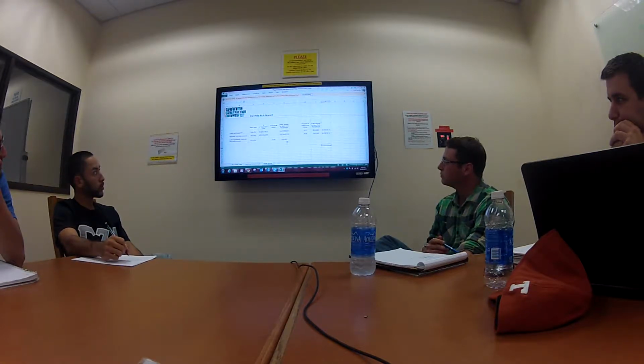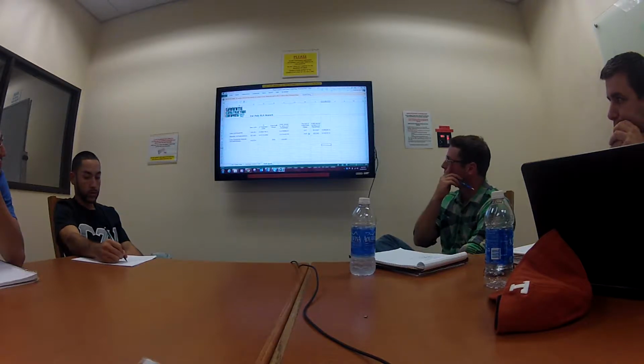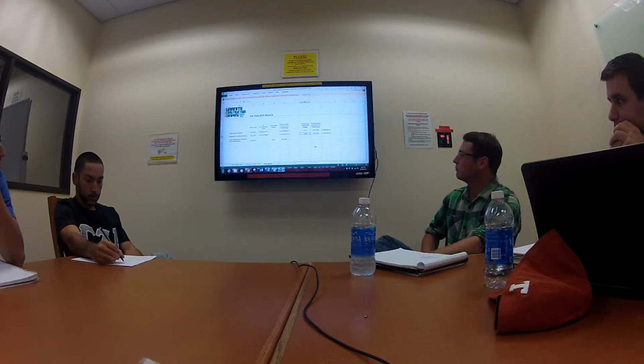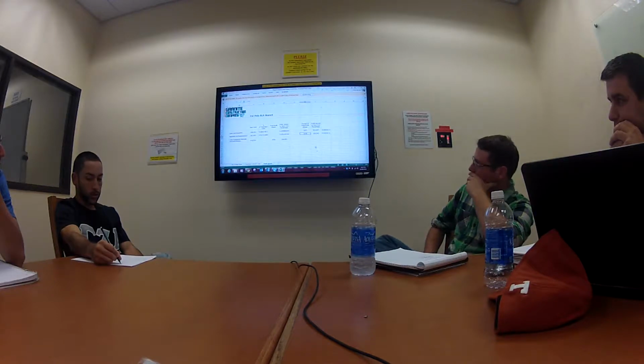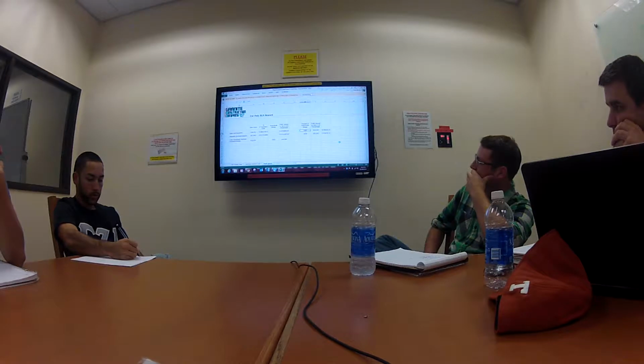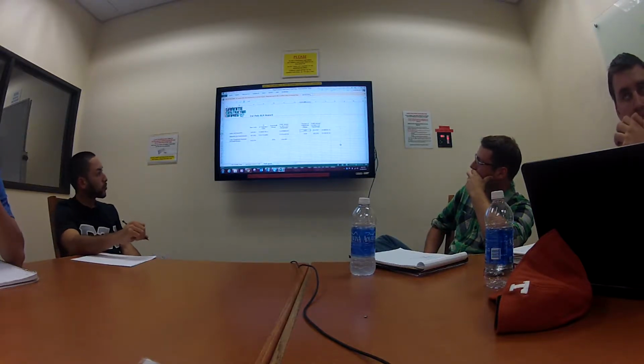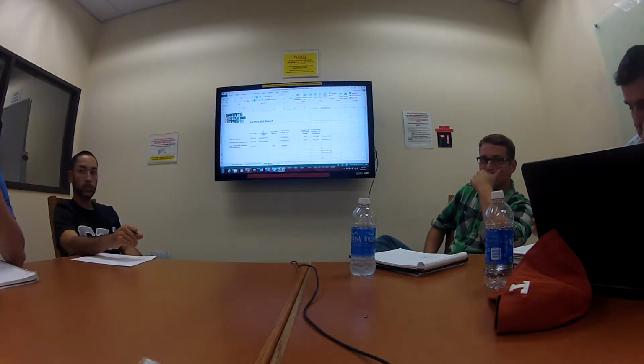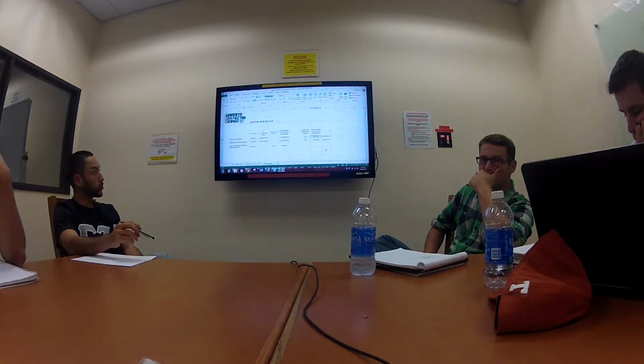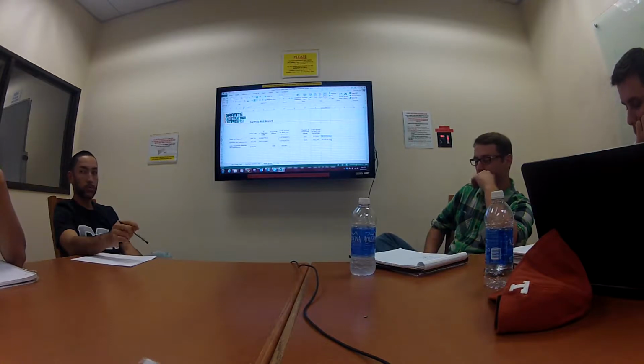You can see over there in H, percent of total profit margin, I put 67% of our profit margin that I spread to labor and equipment items, and 33% to material and subcontract. So I had twice as much money weighted to labor and equipment as I did for materials and subs. Why? Because labor and equipment are more risky operations that are going to go up or down, right?